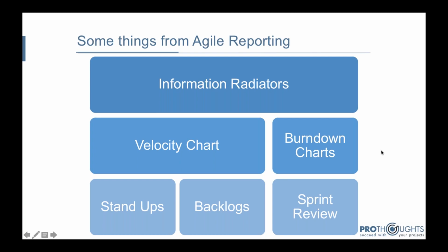Agile does a daily stand-up meeting. It's not a status report as such, because they think that a status report doesn't provide the actual feel of the report. So what they do is conversational, between the project manager and the team, and not with the customer, who is the product owner. They check 3 questions in the stand-up meeting. What you did from the last daily stand-up, so from yesterday; what is your task for today; and are there any impediments that you face in doing your work? So these 3 questions are answered here, and it's a very quick way where everyone talks. So that is not a status report, but a stand-up.